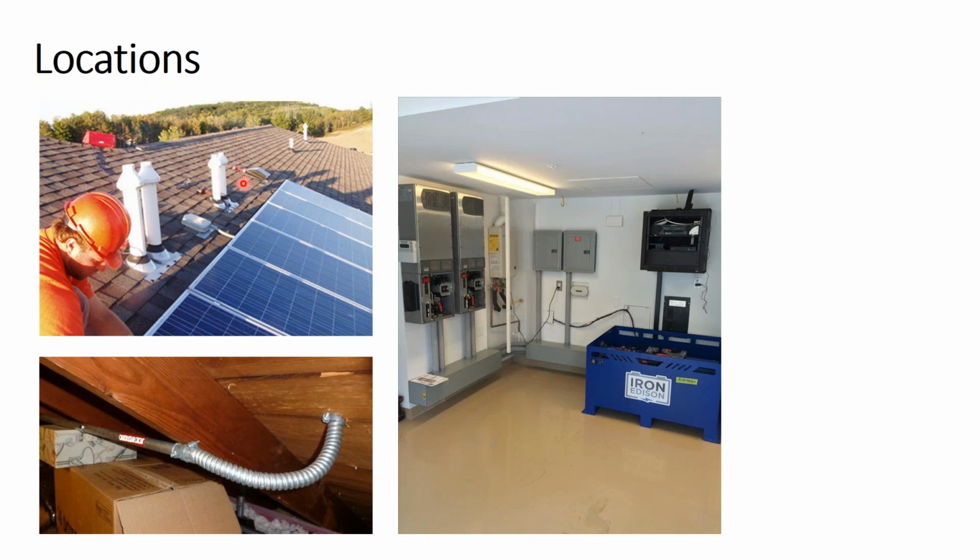And so you could be a solar installer where you're putting all these electronics on a racking system, but maybe the modules have not arrived yet. And so you're putting your microinverters on the rail and then letting them sit for a while until the solar guy does their job. You might be the solar guy waiting for the electrician to come onto their job, so your modules just have these wires that are hanging out the back of them unprotected.